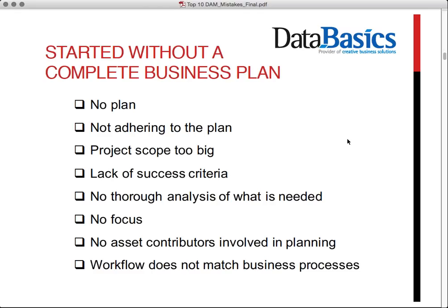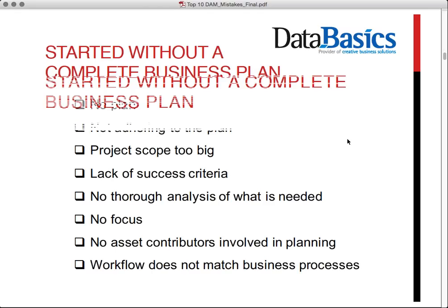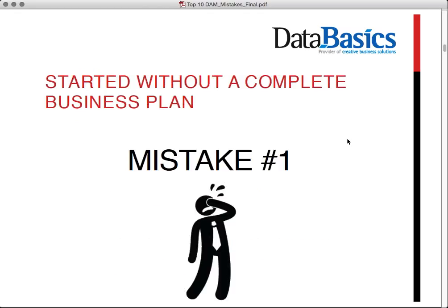Now then, some of the comments that I heard, and we've got a lot to draw from here. Too much in one hit. Thought it was a simple solution rather than a change at the company level, which I thought was very interesting and ties into the 10th mistake, which is did not accept DAM as an operational cost. Underestimation of maintaining the system after initial stages are complete leads to the system becoming out of date, from one of the projects that had been running for quite a while.